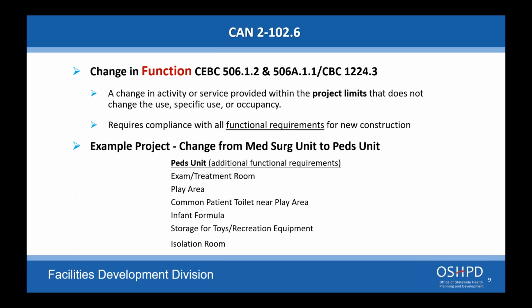Perfect. Next question. For projects that require CDPH's blessing, such as the CT replacement example, what is the proper procedural workflow for the project, i.e., what CDPH form do we use to apply for the procedural use blessing? Do we engage OSHPD first? Have OSHPD reach out to CDPH? What do they do? Good question. What you do is you add all the procedures that are being done in the room in the functional program. It's actually already a requirement, but a lot of people skip over that portion.